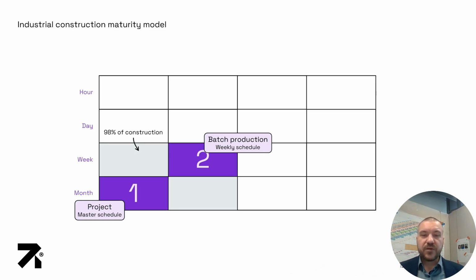Unfortunately, increasing productivity really requires us to increase the level of detail, as it is a mathematical truth that as we increase the detail, then we will be faster and usually have higher quality in production. The next level is the daily level, going from 1 week per floor to perhaps an apartment per day level. And that typically means that in the projects that we've had with our customers, reducing the throughput time of the project by 15 to 30%.